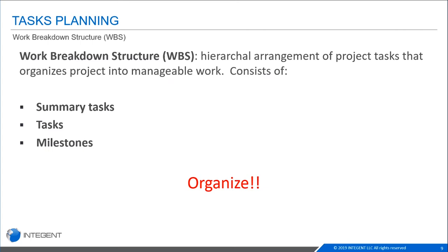We talked about the work breakdown structure, what the summary tasks look like and what their function is. They are primarily the roll-ups of the tasks underneath them. They summarize what that phase or stage primarily is about, and it'll give you all of that rolled up in a nice, neat line. And at the top, it's bolded, makes it very easy for you to see.